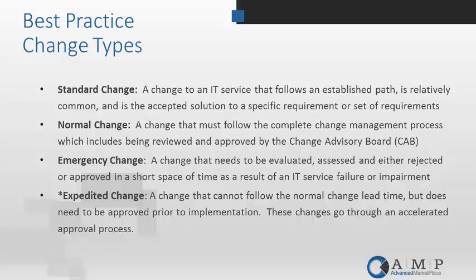I wouldn't necessarily go with the mandated regulation, unless that happened as a result of something else. Again, by definition, typically an emergency should be a service failure or impairment. That being said, in some organizations, they may classify regulated as an emergency change. When I'm defining that, I like to call it an expedited change because it truly isn't necessarily a result of something that is broken, but something that needs to be enacted in a quick manner. Perfect. Okay. All right.